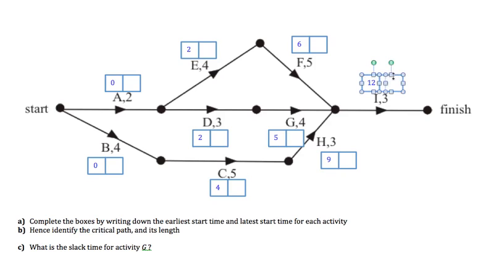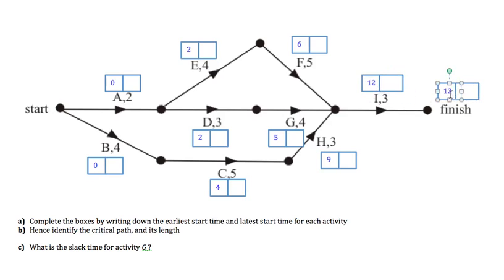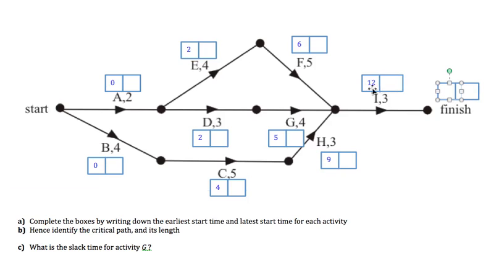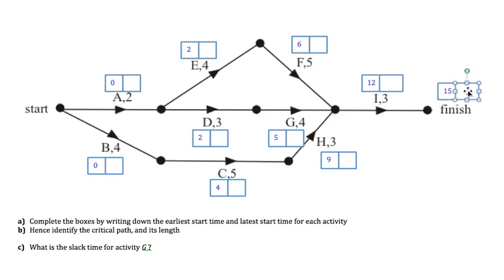It's a good idea to put boxes next to the finish as well, so that we can start working backwards. I can start at 12 and it takes three, so the earliest finish time for the whole project is going to be 15. That's the value we're going to use to work backwards to get our latest starting times — we want to figure out the latest time each activity can start without delaying the overall time beyond 15.